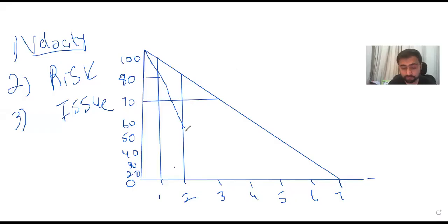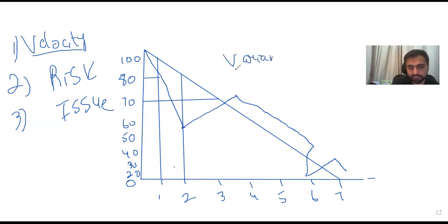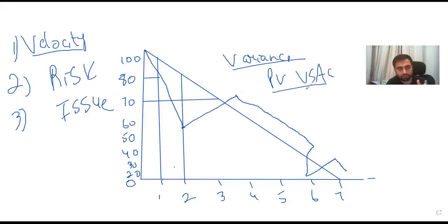But along the way, it is possible that a new user story comes, a user story that is very complex, and after this your progress goes bad compared to the plan. Somewhere you go good, somewhere you go bad. So all the time the burn down chart is giving you the variation between what was planned and what is actual, planned versus actual. So you are actually calculating variance on this.